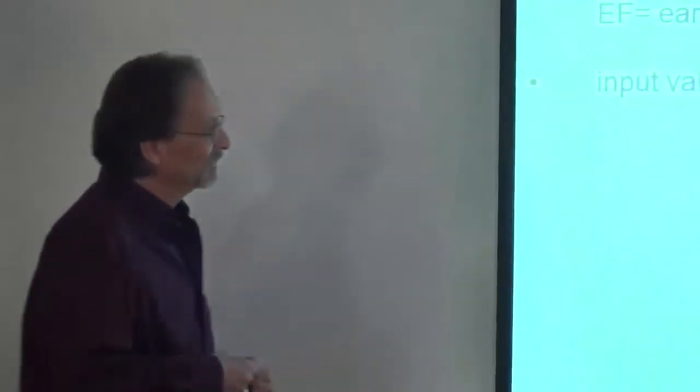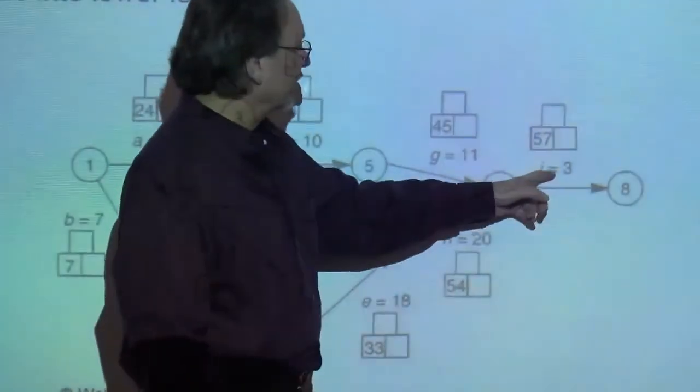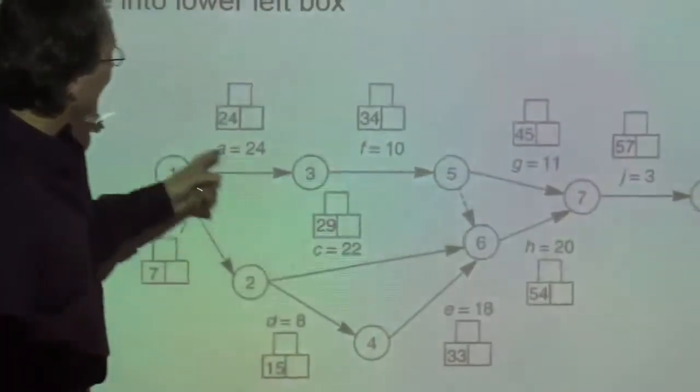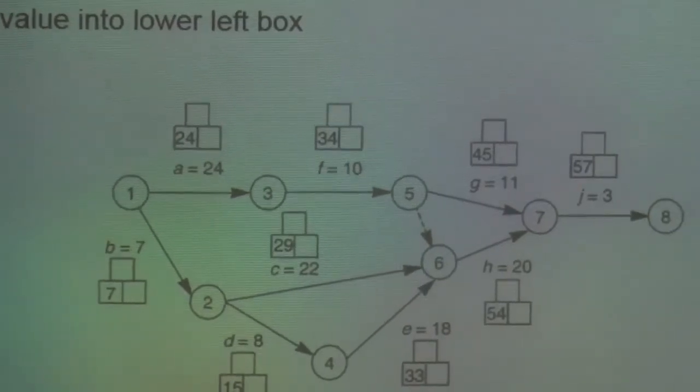So when you're filling this out, it'd be better to fill out the critical path first, and then fill in the blanks, basically. That would be by far the best way to do it. Because we've already determined that our critical path is A, F, H, I. And you can go along that one and fill it out, and then go back and fill the other ones out. Because if something's already filled in, then you don't need to redo it.